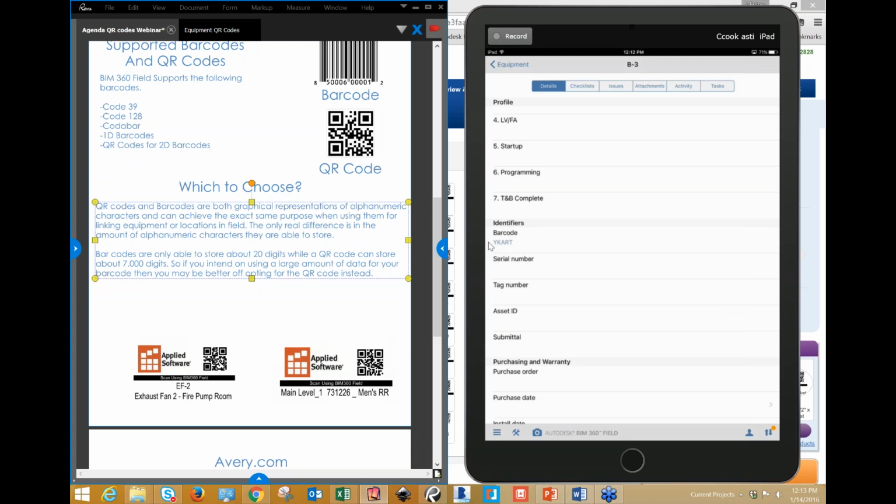Very nice. How long does it take to populate all of these labels? It's really not difficult if you did the preparation and the front end for your locations. It adds literally 30 seconds before you import. You just put that LOC underscore and then the first sequence of numbers and then drag it down.